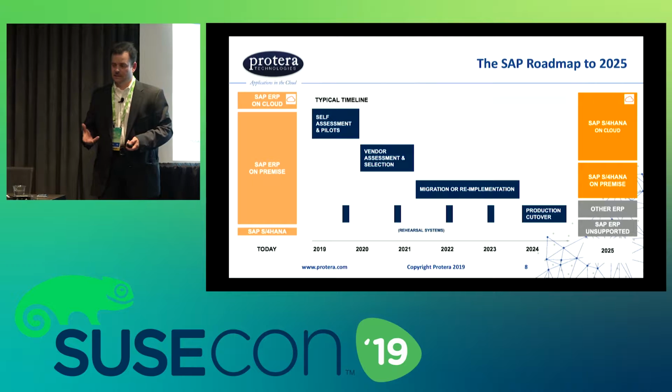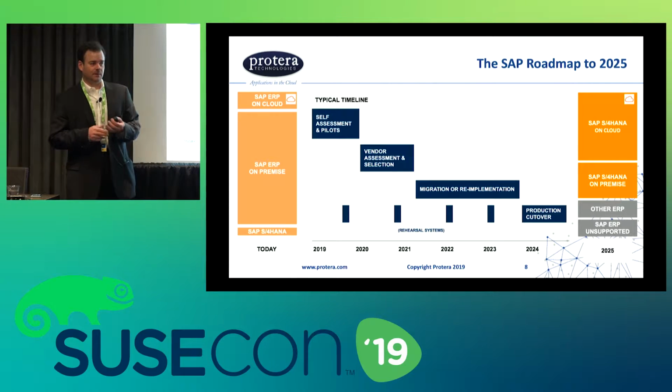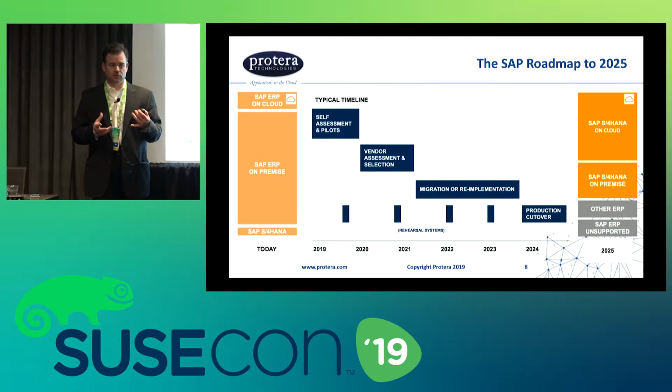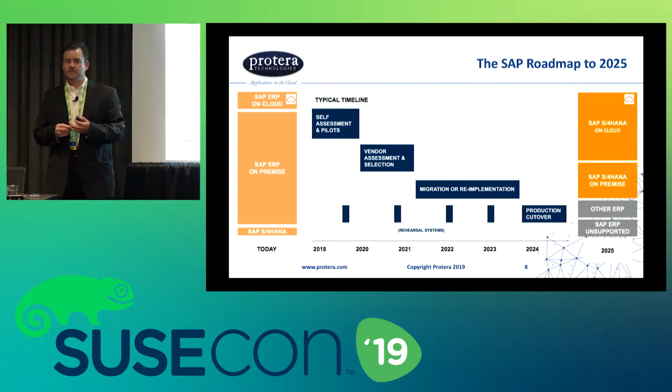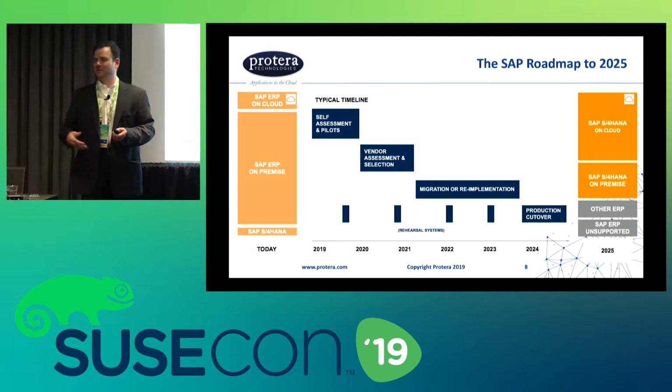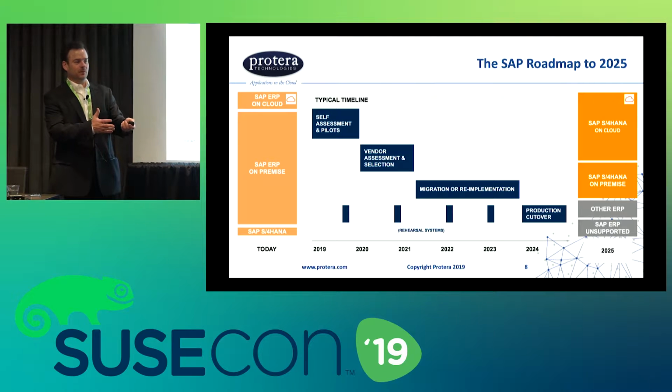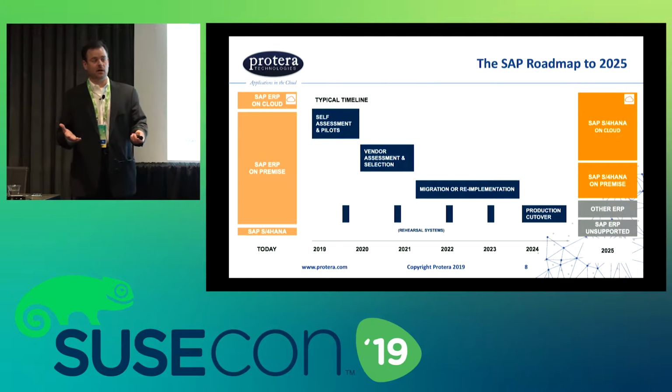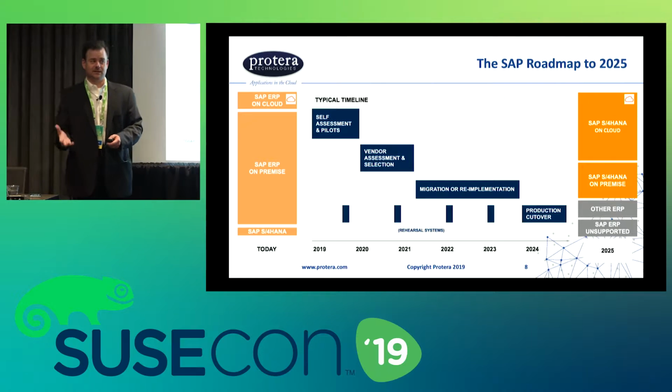And you may remember this name. It came into being with the ASAP methodology in the 90s. SAP had the term the dress rehearsal. And the idea behind that is you would get ready for your go live as a dress rehearsal for a play. And you would practice and get ready for your production system. And oftentimes that was brand new hardware. And so you'd be able to do your stress testing in that.